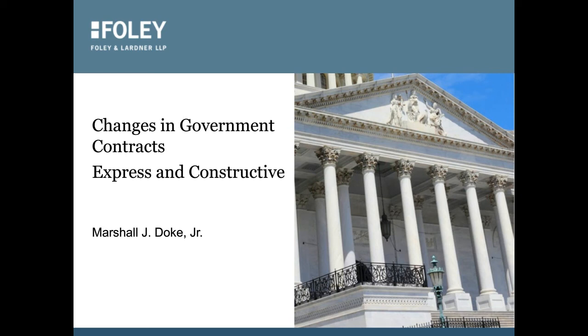The contractor has the burden to prove the amount of the increased cost, the burden of proof. Many smaller contractors don't have sophisticated cost accounting systems to accumulate the cost of changes separately in order to be able to prove the amount of the increased cost. Cost accounting is completely different from financial accounting. Many CPA firms have little expertise in cost accounting. The big firms, if they have cost accounting expertise, it's usually in Washington. It's not in San Francisco or Dallas or Chicago or so forth.